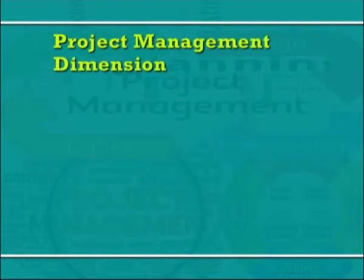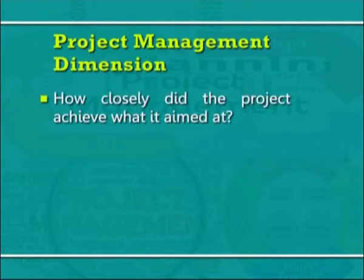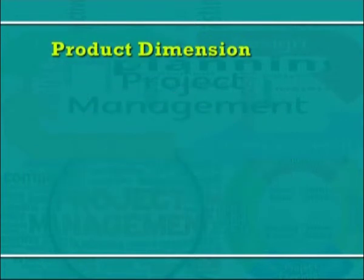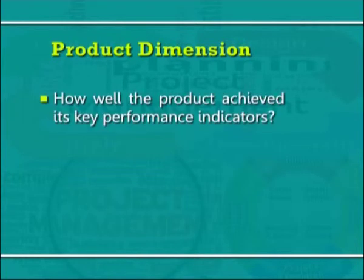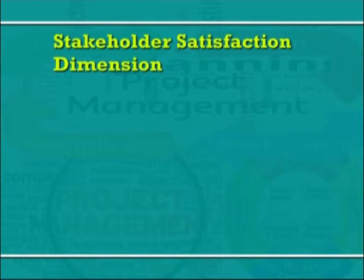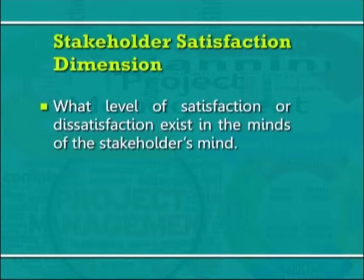Project management dimension — how closely did the project achieve what it aimed at? Did the project meet any specific objective which was specified before starting of the project? Product dimension — how well did the product achieve its key performance indicators? What were the critical success factors? Stakeholder satisfaction dimension — what level of satisfaction or dissatisfaction exists in the minds of the stakeholders?